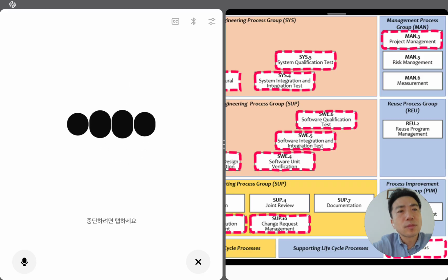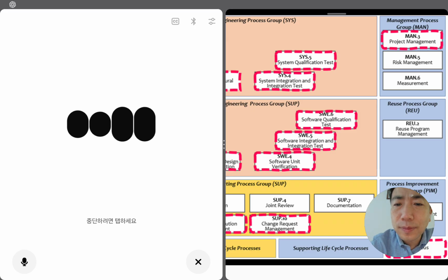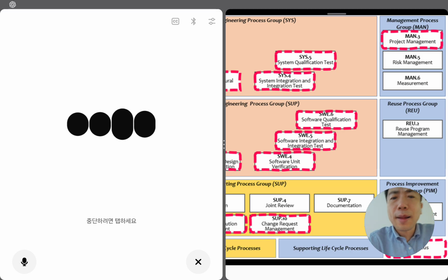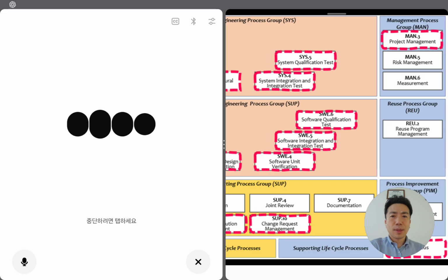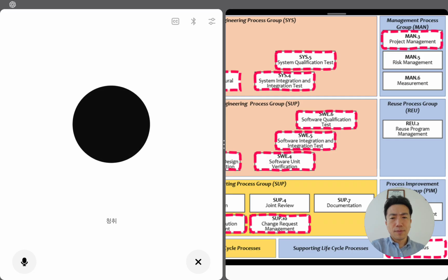Good thinking, David. That's a very PM question. A configuration list is basically the inventory of all key project items that must stay under control, the stuff you must version, baseline, and track. For a project manager in Aspis, it usually includes project plan and schedule, requirement specs, test plans, change requests, design and source code baselines, review minutes, risk logs, KPI dashboards, and release packages. Each one should have a clear owner, version, storage location, and baseline date. Would you like me to walk you through a simple example table, like how a PM could organize that configuration list in Excel?